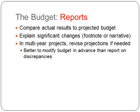I once had a project that we had gotten a large grant for, and we were getting near the end of the grant period, and I hadn't really heard the program staff talking about all of the parts of the project yet. There was one thing that they were supposed to be doing, a professional development part, that I was pretty sure they hadn't done. And the grant was to be completed in 3 months. So I asked the program staff what was going on, and they said no, they hadn't gotten to it yet, and it was actually going to take them 9 more months to finish it.